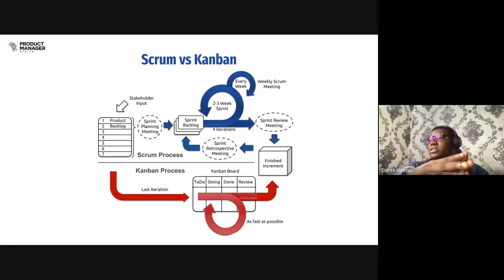During sprint retrospectives, you don't allow external stakeholders to join calls like that, because you want your team to be fully open and communicate about what somebody else could have improved on. And this is not a blame game. This is more like, they're being very intentional about, okay, this is how we can improve next time and finish off the items that we have on our sprint backlog, right? And everybody takes ownership for things that they need to improve on. This makes teams self-organizing. This is actually the entire essence of Scrum itself.